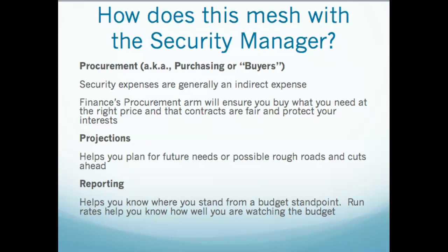Okay, so procurement, when you go and you say, I want to buy two-way radios, right? We'll stick with the radios for this discussion, and I need 10 of them. And they ask, well, how much do they normally run? And you say, oh, $2,500 a piece. I'm going to need $25,000 worth for these 10 radios. They will go out and they will say, okay, give me the specifications on the radios you need. What must they do? Well, they have to communicate back and forth. They need to have a removable battery that lasts for at least 8 hours. They need to have a little red button on the top that if I push it, it sends a signal to let somebody know that my guard is under duress. He's got a problem. I needed to have at least 4 different channels